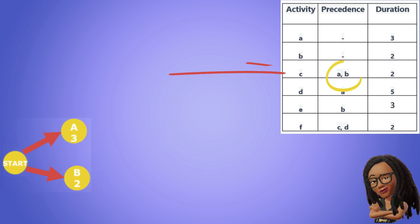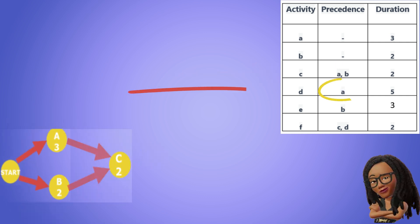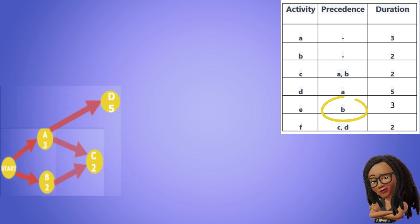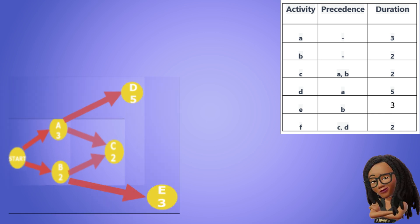C has both A and B as predecessors, so we connect them like this. D has only A as predecessor. And our last activity, F, has both C and D as predecessors.